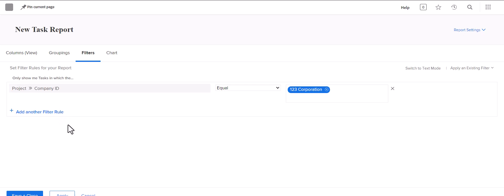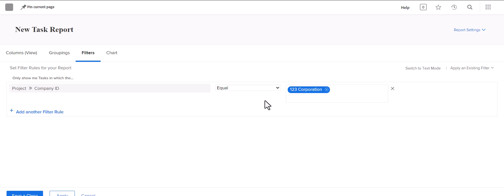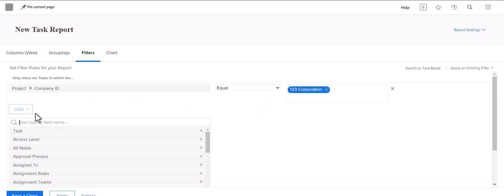The next thing to think about is: do I want to pull all of the tasks in those projects? Because right now that's what this will do — whether they're open or closed, whether the project is current or in the past, it will pull everything. So you want to whittle down from there. If you only want projects that aren't completed — only that are current — I recommend starting with the highest level, and what you're looking for is status.